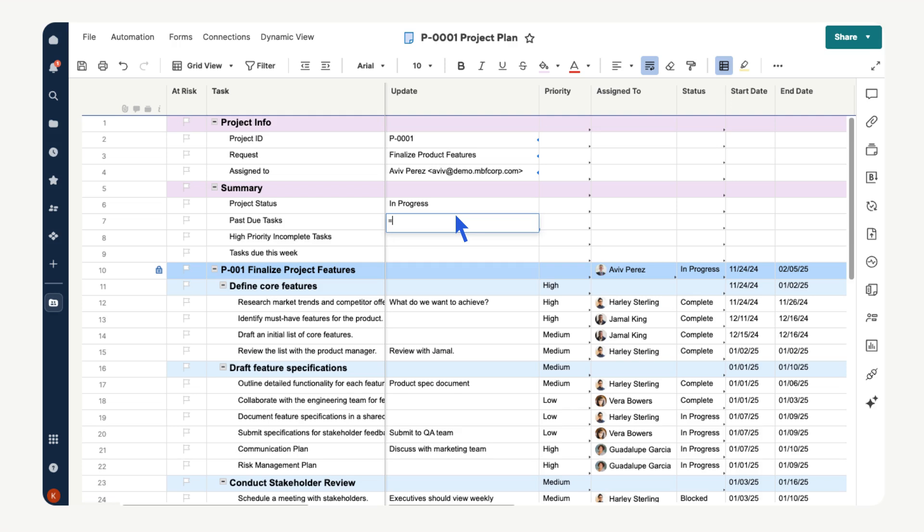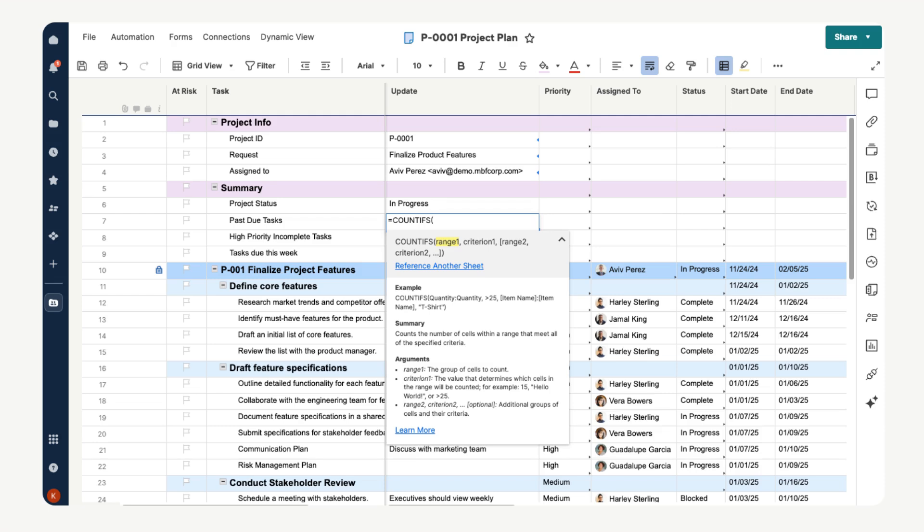Next let's write a COUNTIFS formula to tell us how many tasks we have that are incomplete with a due date in the past. Type an equal sign, type COUNTIFS. This function looks in a particular range and counts only the rows that match the criteria. Our first range is our end date column. Put the column name in brackets and separated by a colon to tell the formula to look at the entire column. Then our criterion is any date less than today. Use the less than arrow and a today function.